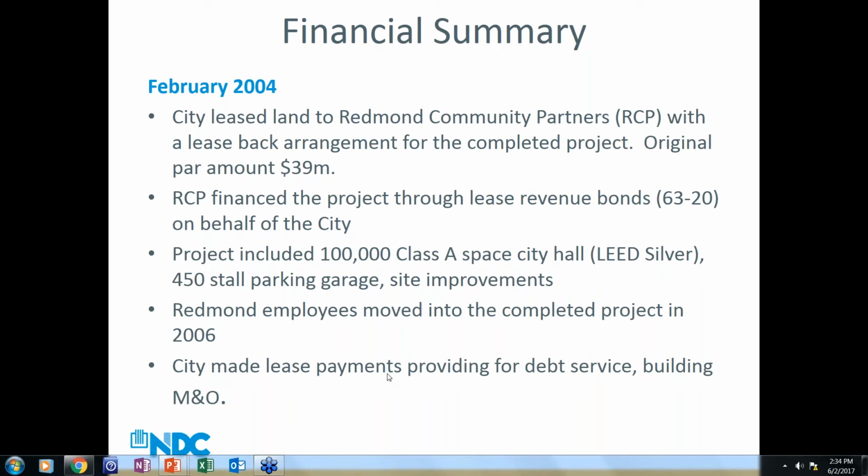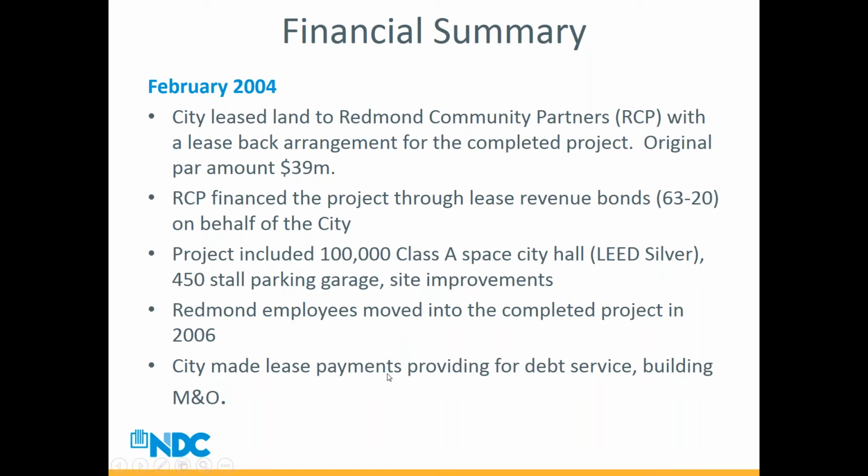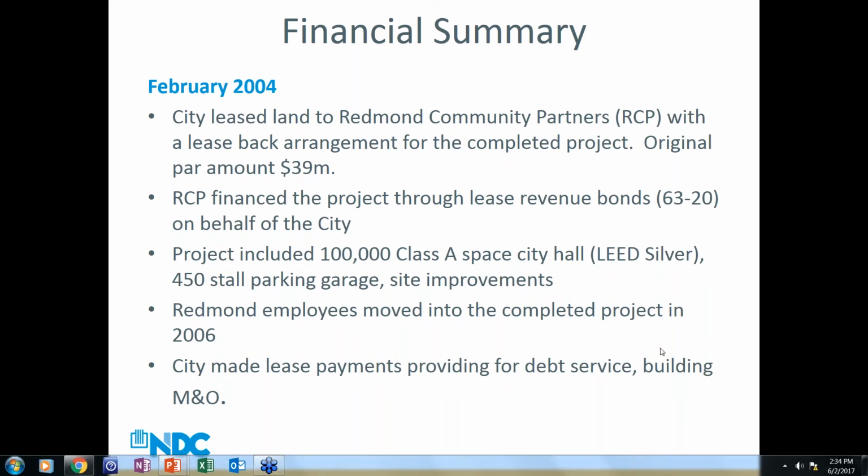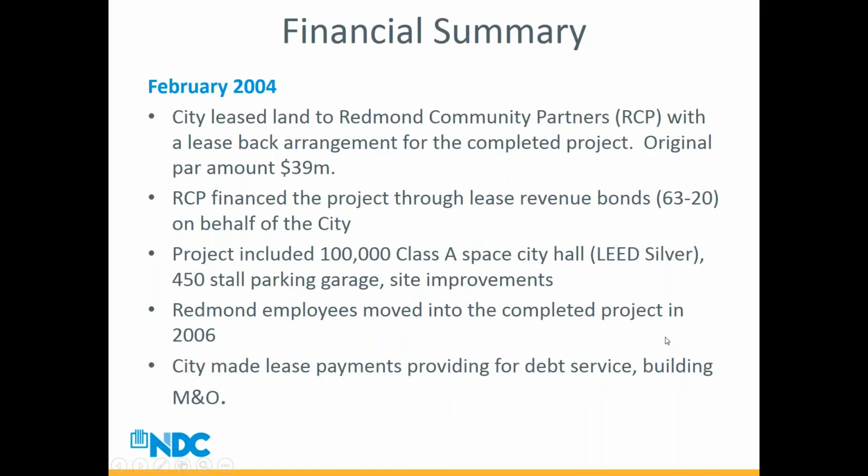The lease payments that we ended up making to Redmond Community Properties, the last bullet point, not only provided for the debt service that was incurred by Redmond Community Properties, but also for the ongoing maintenance of the building, which continues to be provided for today by Wright Renstead, as well as the reserves that Jane mentioned were part of the concept, so that we could make the kinds of investments that kept the building in great condition during the term of the financing, so that we ended up with a building that throughout the duration was meeting our needs.